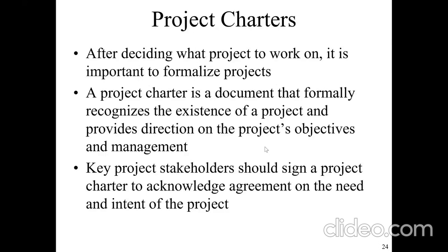So it is important to formalize it by creating a document that will cover the project. A project charter is simply a document that formally recognizes the existence of a project and provides direction on the project's objectives and management. Who is in charge of the project? What is the project going to do at the end of the day? So key project stakeholders should sign the project charter to acknowledge the agreement on the need and the intent of the project. So it needs to be signed by key stakeholders.